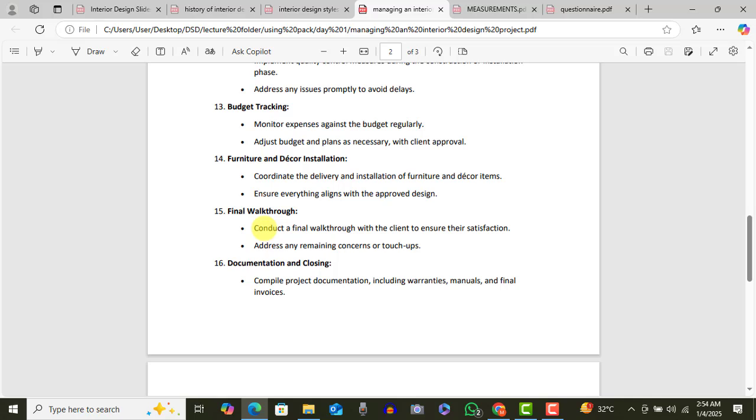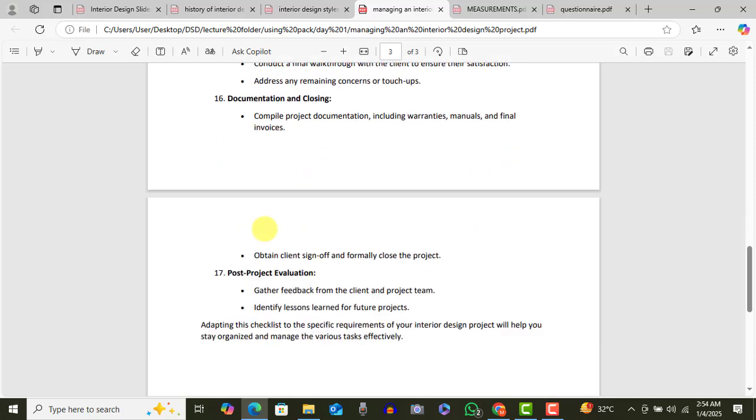They sign it, they give it to you. If there's a warranty you want to give them, that's up to you. So that in 3 months' time, they don't come to you and tell you that at the end of the year, no. There's a document that says that you've inspected everything, it is as it should be, I've handed over to you. If you are asking me to come and do something, I can charge you for it again. You are covered legally. Do you get it? It's very important. All right.